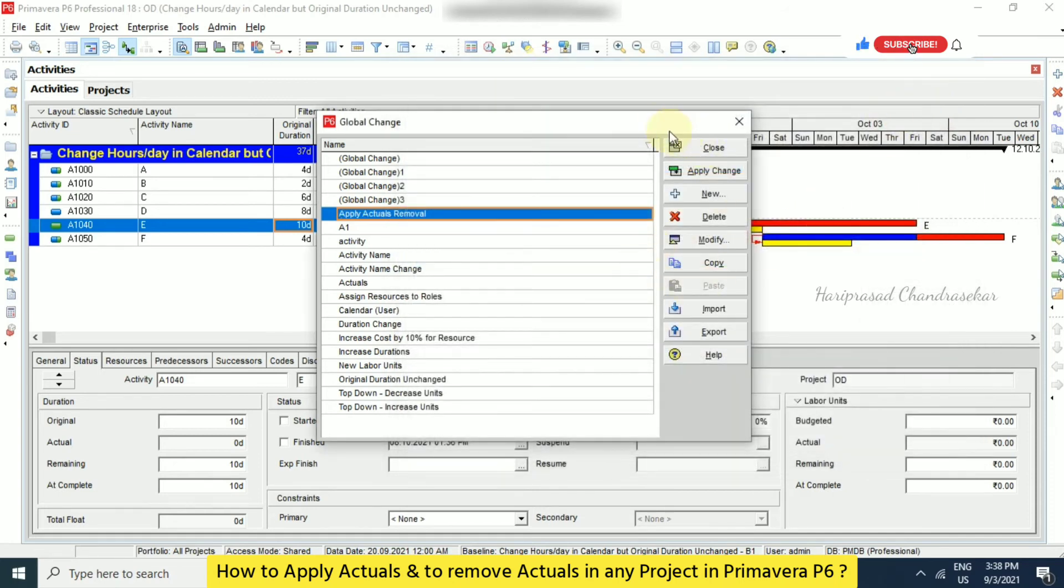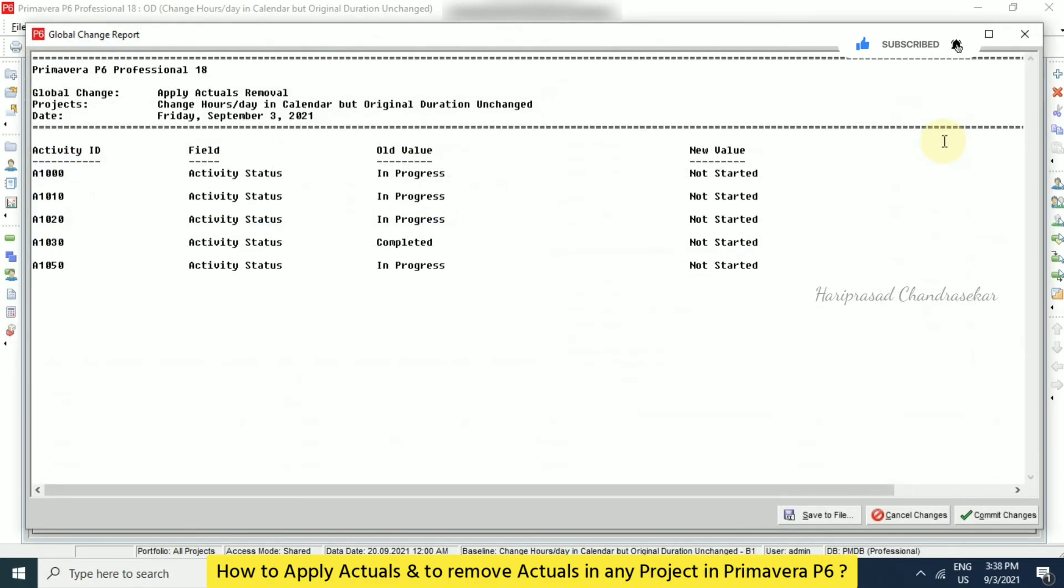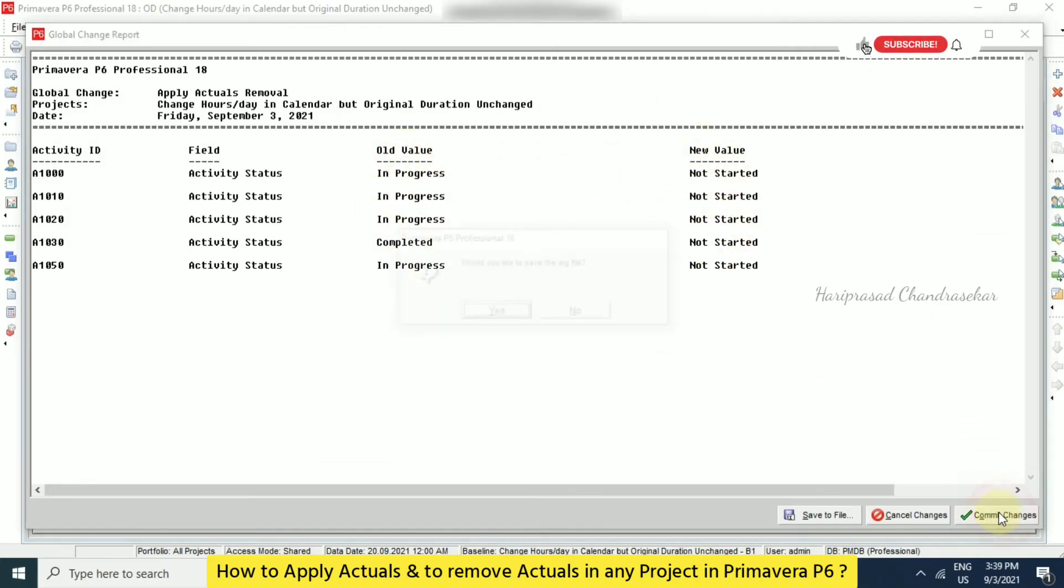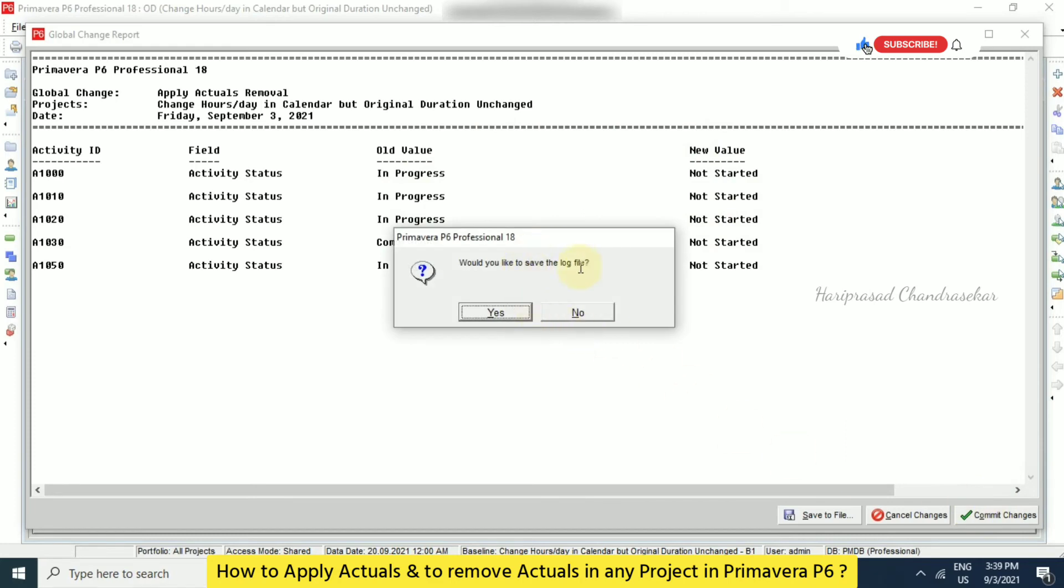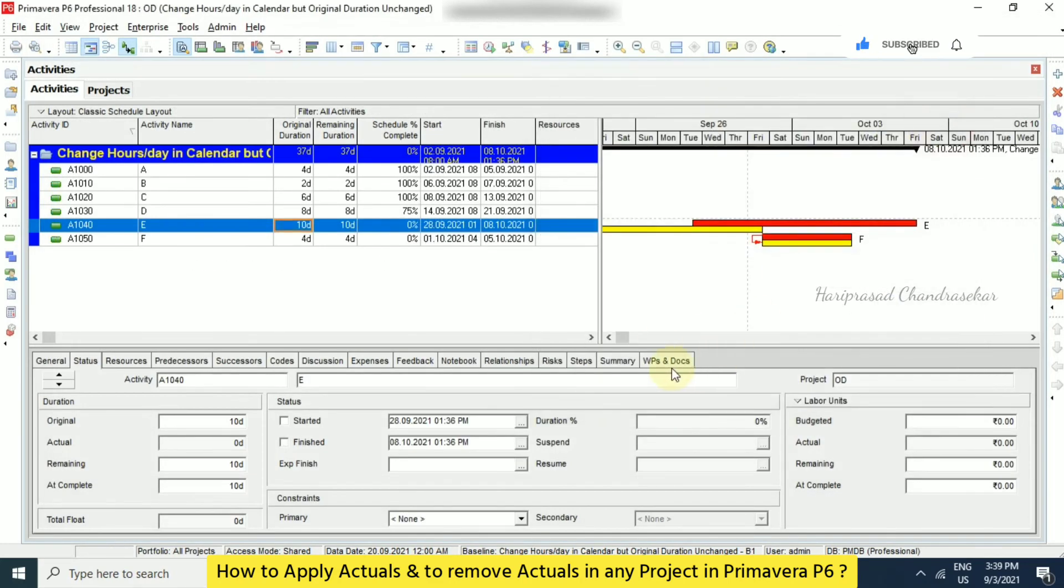Now we can just go for apply change. See here we can see the old value and new value. See all these things will get changed to not started. And we can go for commit changes. And no need to save the log file. Close it.